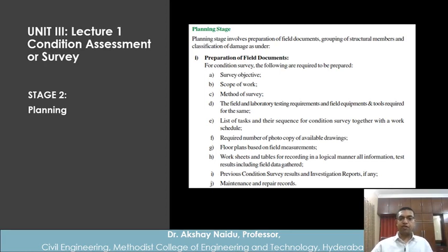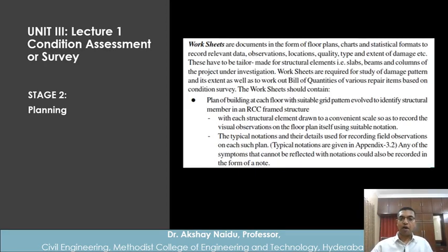floor plans based on field requirements, worksheets and tables for recording in a logical manner all information, test results, including field data gathered, previous condition survey results and investigation reports, if any, maintenance and repair records. So this is preparation of the documents. In planning stage, there is just preparation of the documents.